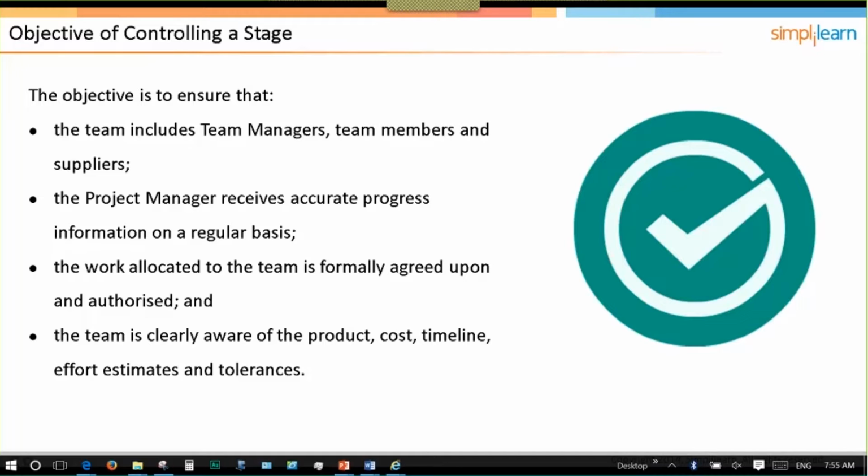Actually, I did not introduce myself in the first place. I'm Pranav. I have nearly 4 years of experience as a business analyst. As a business analyst, the process in my company goes in such a way that we initially get the requirements. If we don't freeze the requirements in the initial stage, and it keeps on going, it crosses the project budget. So that is the reason we usually get the sign off in the initial stage and then get the other requirements as future enhancement. So that's how it goes on, basically.